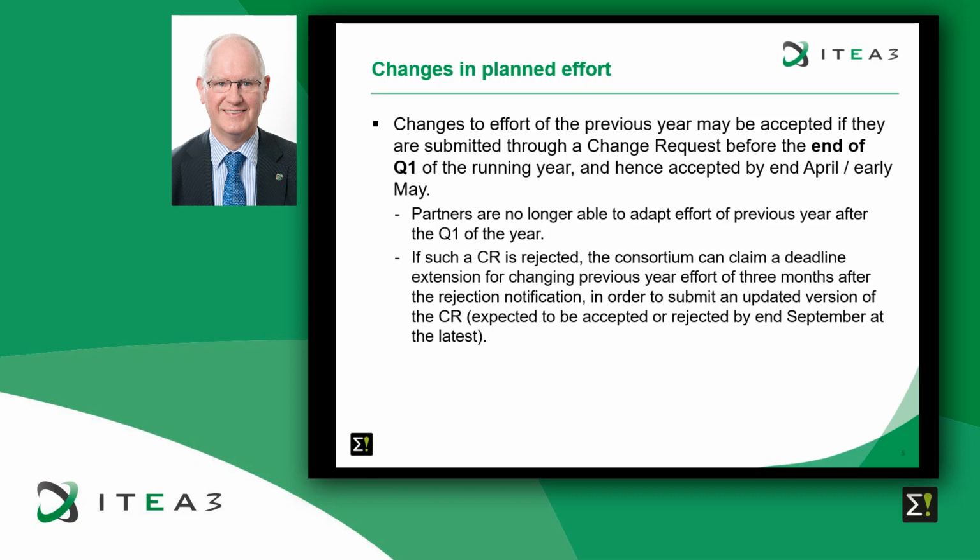Changes to the effort of the previous year, as with the costs in the old situation, may be accepted if they are submitted through a change request before the end of Q1 of the running year, and hence accepted by the end of April, early May. So partners are no longer able to adapt effort of the previous year after the Q1 of the year.